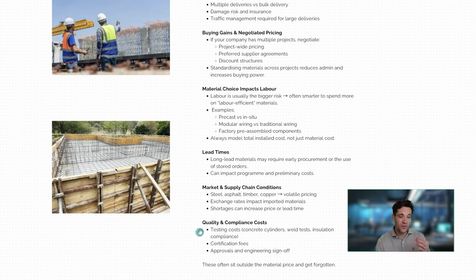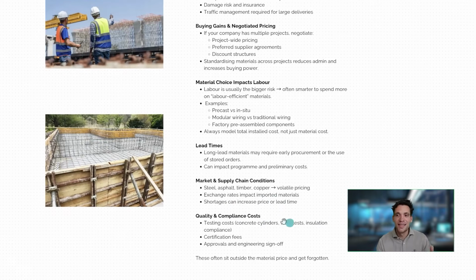You often see an electrical wholesaler put a term on their offer that says these prices are based on variability of copper prices of less than plus or minus 10% from when they've made the offer. You just have to consider how these factors outside your control are either de-risked in your contract, whether you pass that same exclusion onto your clients, or you're managing that with your supply chain.